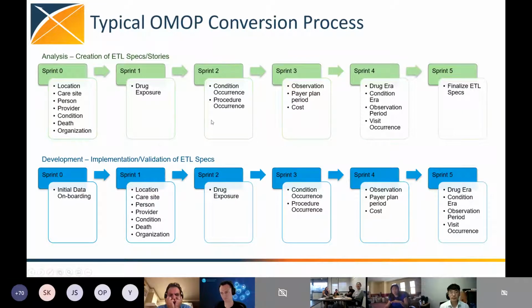Now, you don't have to do it this way, but what we've noticed is we always do what we call the dimension tables first, the lookup tables first. And that's because all the other tables are reliant on them, they're foreign keys to this guy. So that's why we do these first. And we always leave the error tables, the observation table, and the visit tables for the end, because half the time these guys impact the visit table and the observation period table and the error tables, right?